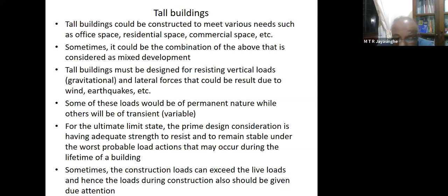And these days, there's a huge supply chain management issue caused by COVID-related restrictions. In many parts of the world, supply chains have collapsed, and it might take five to six months before the supply chains come back to the normal level. Until such time, many parts of the world will have a huge shortage of materials. It has nothing to do with the dollar shortage in Sri Lanka, because it's a worldwide supply chain issue. Because of that, you'll find that many goods will be very expensive in the short term, but the chances are the prices will come down as the supply chain issues are sorted out.